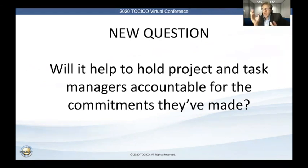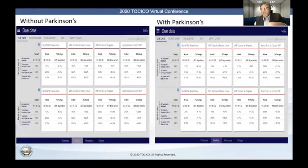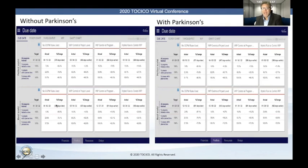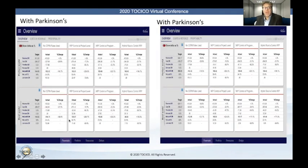That was what we presented. And of course, as I mentioned, you can imagine sitting there in a boardroom pressing the play button and literally seeing how those profits they were hoping would be realized are evaporating in front of their faces — a massive swing in profitability of about a quarter of a billion dollars. Can we do better? Yes, we can do a lot better just by changing these rules. But then one manager asked: what if we don't implement these rules and just put in accountability — tell project and task managers you made commitments, we're going to hold you accountable. And of course, we can model that as with and without Parkinson's Law. Rather than being 590 days late, we're now going to be 690 days late; rather than losing around $100 million, we're now going to be losing $150 million. So turning estimates into commitments definitely didn't help — it only harmed.